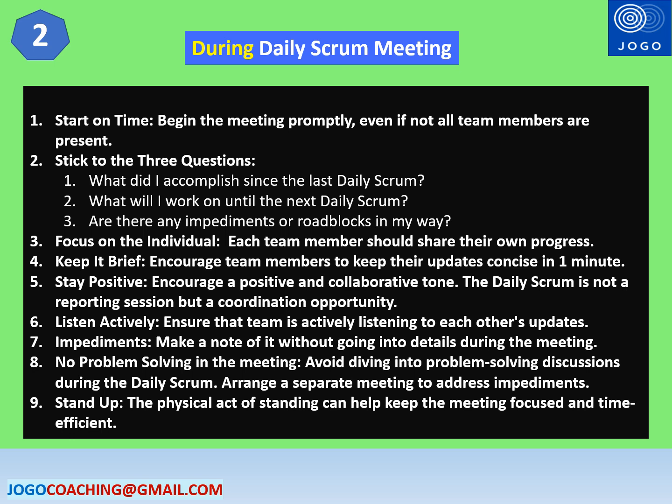You can check and ensure the following checks during the daily Scrum meeting. Start on time. Begin the meeting promptly even if not all the team members are present. This will encourage the team members to join the meeting on time in future and bring discipline.